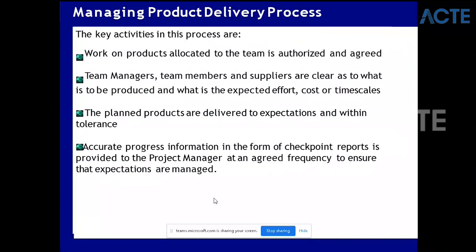That's why it is important to have an updated risk and issue register, and the project manager should discuss with the team every three days to a week on all these things - that's how they will manage it. Will descoping affect the business case? It depends. If the issue is not going to impact your core deliverables then it is fine, you can do that - but you have to take agreement from all the stakeholders and the executive.